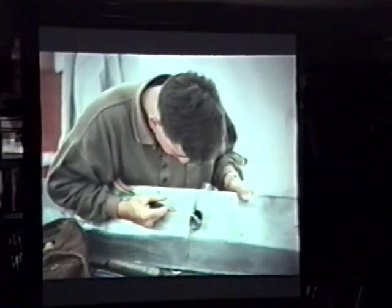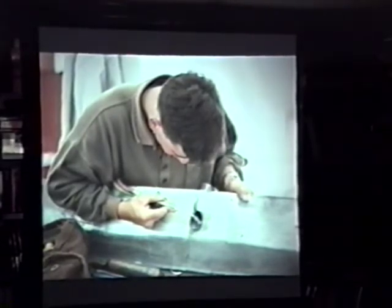And part of this stems from a disastrous fire that occurred in England that totally destroyed one of their manor homes. Because simple repairs for lead work were being done, some sparks caught the dry wood, and in a matter of minutes, the roof was in flames. Through a series of mistakes, the wrong fire crew was called, and when the right fire crew was called, they got lost. The curators were more concerned with getting objects out of the house than fighting the fire. Through a number of these mistakes, they lost the entire building. So all of the hot work was done off the roof in a special protected fireproof work area.